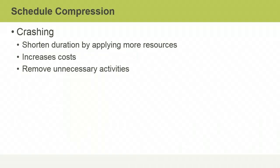Schedule compression involves reducing a project's duration without changing its scope. Two ways to do this are crashing and fast tracking. Crashing involves shortening the duration of activities, usually by assigning more resources to those activities, and involves making trade-offs between costs and the schedule. Crashing can also involve identifying which activities are truly critical and removing activities that are important but not critical, which may require re-sequencing remaining activities and changing the project's critical path.